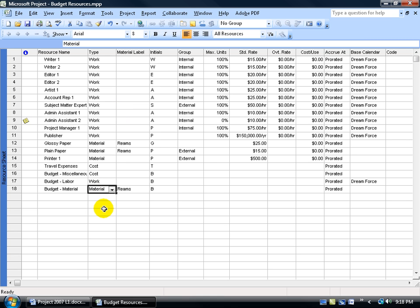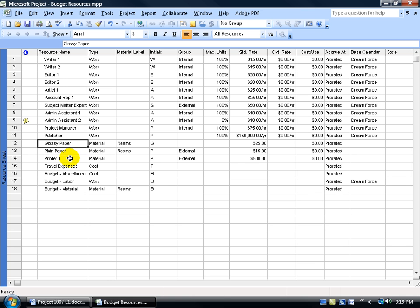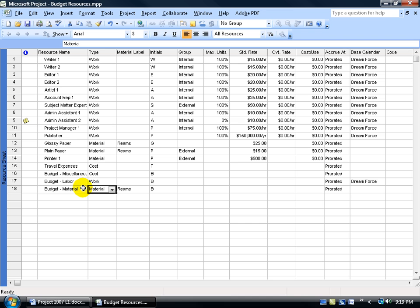The same applies for materials, except materials is going to be in units. If I have five reams of glossy paper, five reams of plain paper, and one printer, the total units assigned for materials is 11. So you're budgeting 11 units. If the glossy paper got shredded in the printer and we had to purchase another ream, we're up to 12 units. In another view, you compare that against your budget of 11. It's an FYI so you don't have to open an Excel spreadsheet to compare what you budgeted for work, materials, and costs like travel expenses.